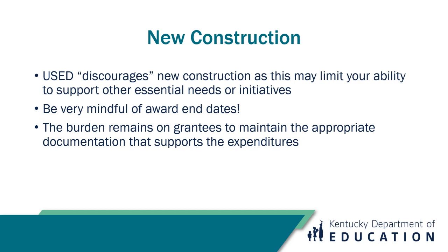So some of these projects, in light of our recent labor market demands, as well as material and getting construction companies on site, there may be some issues with timing. And the demand for these construction companies, I know the demand in other industries is very high right now. So you need to really think that through to make sure you're going to have plenty of time to finish. Any delays in getting material, or in the next 6 months, what does that all look like? Will you be able to get steel?